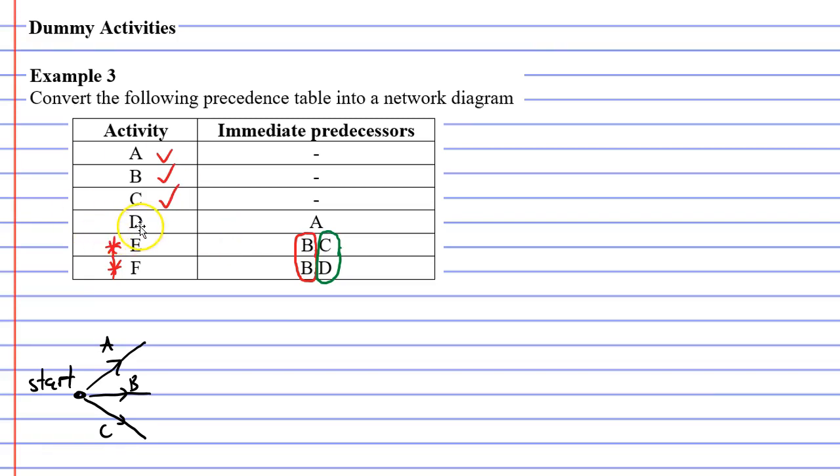Now looking at activity D, it comes after activity A. So we need to complete activity A with a vertex, and then activity D comes out from that point. So we'll tick off activity D.